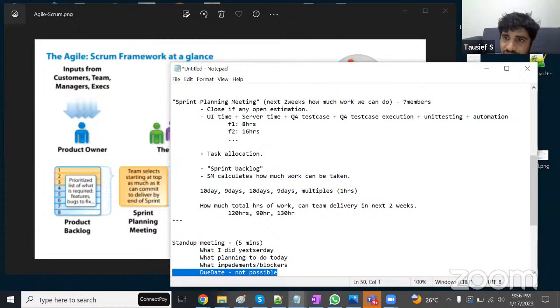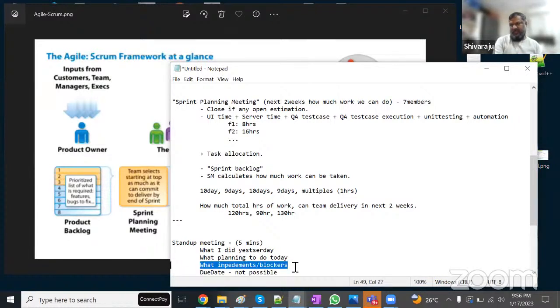Yeah, so in this impediments related, the developers should be very clear what kind of impediment you are facing. There is a thumb rule in our company: the 15 minutes thumb rule. As a developer, if you are working on a feature or something, if you get stuck somewhere, try for 15 minutes, not more than that. If you can resolve, then fine. If you could not resolve, then take your laptop, go somewhere, reach somebody, get the help, but don't waste the time. So if you apply this 15 minutes rule, then there won't be any impediments in our sprint execution part.